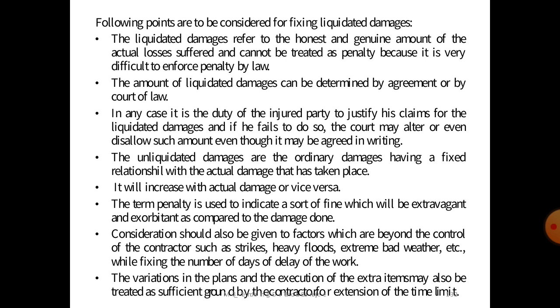Fourth point is that unliquidated damages are ordinary damages having a fixed relationship with the actual damage that has taken place, and it will increase with actual damage or vice versa. The term penalty is used to indicate a sort of fine which will be extra and exorbitant as compared to the damage done.